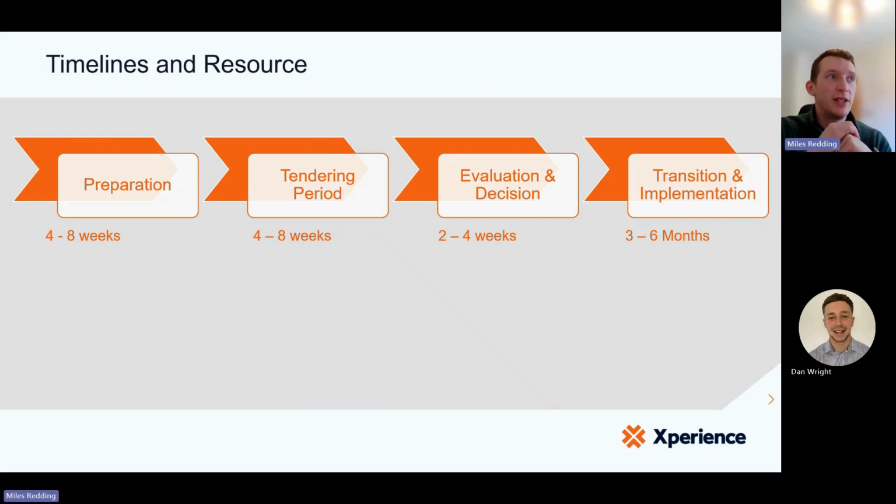The preparation phase is really the analysis and the definition, because that is all internal. That's you understanding where things are, how things sit, how they fit together, and what you want to achieve from this process, outlining that specification. Whilst this can be done in a shorter time frame, I think a realistic expectation is typically 4 to 8 weeks, as sometimes you'll be reliant on your incumbent provider to provide some of that information, and that may naturally take some time.